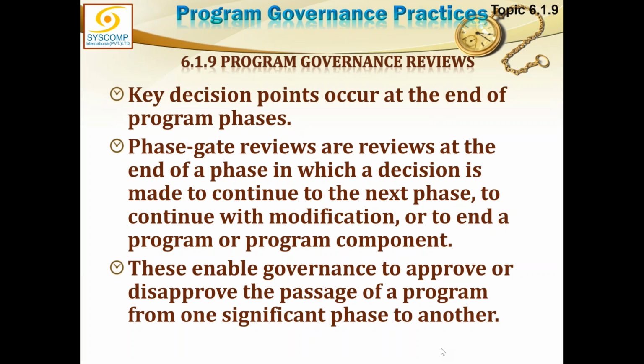The phases in project are very different. I have explained it to you earlier. The phases in project are created according to the work of the project, and every project may be different. For construction, there could be different phases. For software development, there could be different phases. But because program is more holistic in nature, program has got standardized phases.